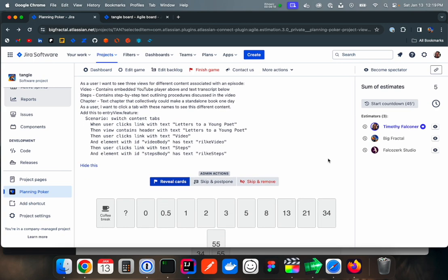Now, a very important part of sprint planning is having a number in mind for what can be accomplished in the sprint, which is called the capacity of the sprint. So, for example, last sprint, I completed 7 story points. This is the number that grows as you go. In general, you want to hit your velocity, which is your capacity, and then add on some more. For example, if you did 20 last time, you want to pick enough tickets for like 30, so that if people finish early, they can continue.